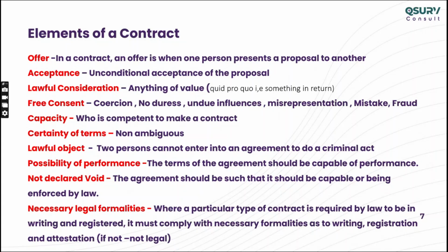Just imagine a scenario where, when he signed the contract, in the bracket or somewhere he writes down accepting the contract subject to employer will provide me this thing, that thing, or employer will provide me scaffolding, water supply, subcontractor. That is not a valid acceptance. If there is no valid acceptance, please keep in mind your contract is not valid at all.